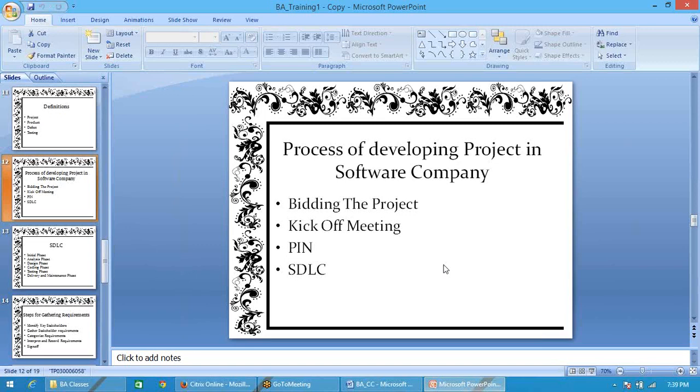Once the project is signed off, the kickoff meeting is conducted in order to discuss the entire view of the project. First they bid on it, then whoever the customer chooses, after signing the papers, they have this meeting. The people involved will be the project manager, technical manager, quality managers, test engineers and tech leads, and they'll be discussing the high level requirements of that particular project.